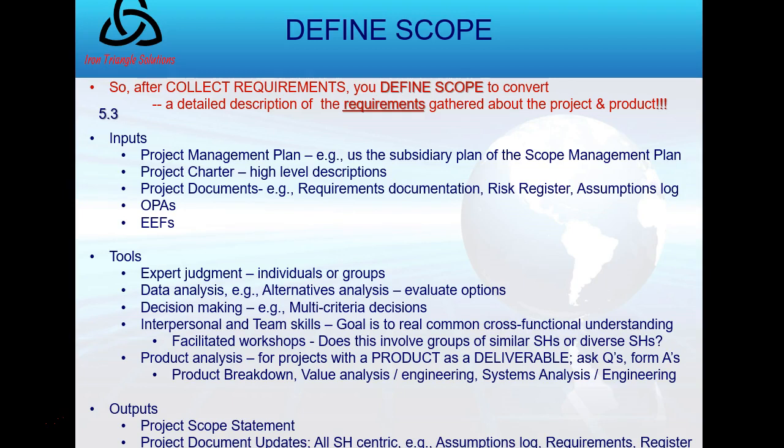So my project scope statement is my big output. It will list the project scope, the major deliverables, my assumptions, constraints. The entire scope is listed, including the project and product scope. It will even contain explicit scope exclusions. What's not in my project?